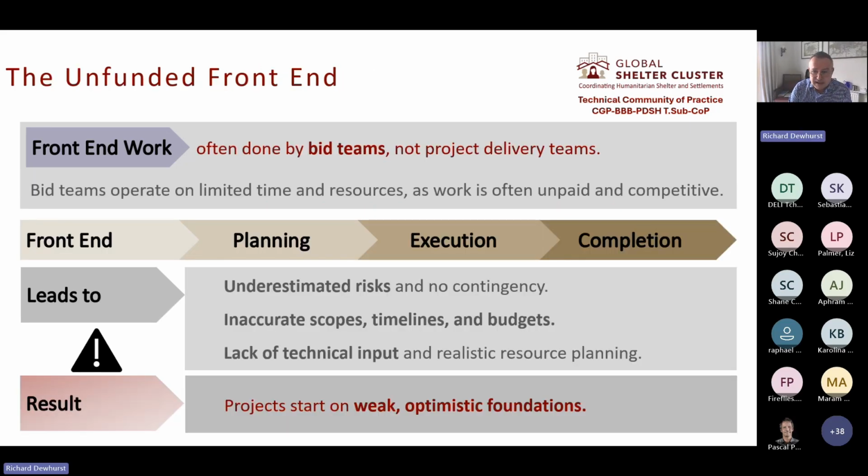So the front end of ID or development construction projects is often handled by the new business or bid teams rather than by the delivery teams themselves, or anyone with any construction experience. These bid teams work with very limited resources, limited time, in a competitive environment. And as a result, risks are often underestimated. There's little or no contingency planned in.